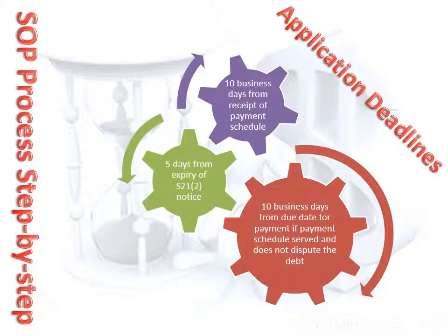The Act sets out strict timelines as to when you may lodge an adjudication application. Essentially, there are three situations. The first is when the client has served a payment schedule promising to pay the full amount by the due date, then does not make the payment. The second is where a payment schedule has been served, but the client disputes the claim, offering to pay only part or none of the payment claim.